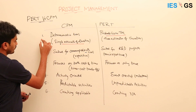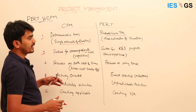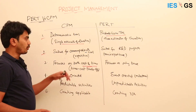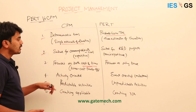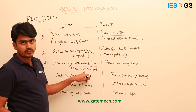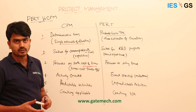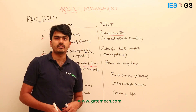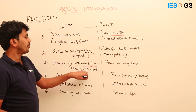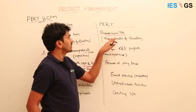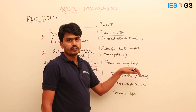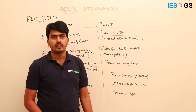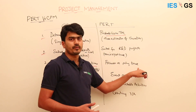The third difference is from a planning and scheduling perspective. CPM focuses on both cost and time because these are large-scale, non-one-time projects. It tries to optimize and minimize both project duration and cost — this is called the time-cost trade-off. In R&D projects, PERT focuses mostly on time, which is unknown, and aims to arrive at time-based project planning and scheduling.